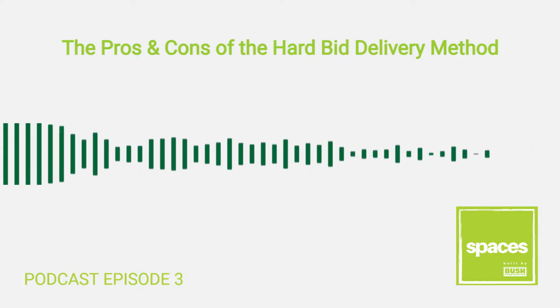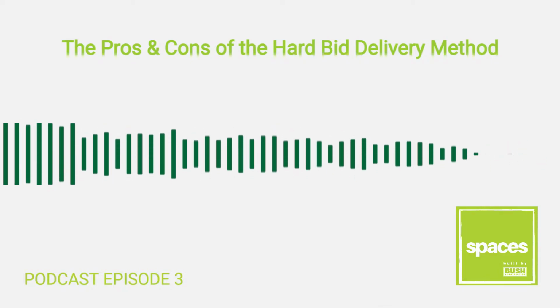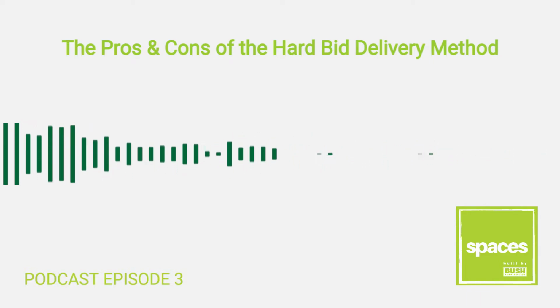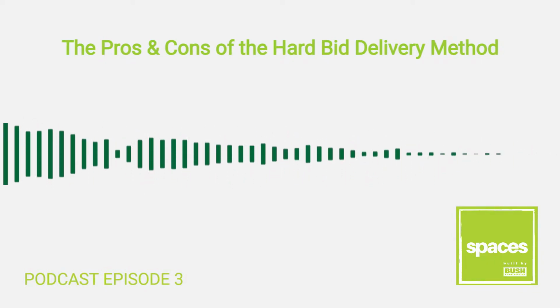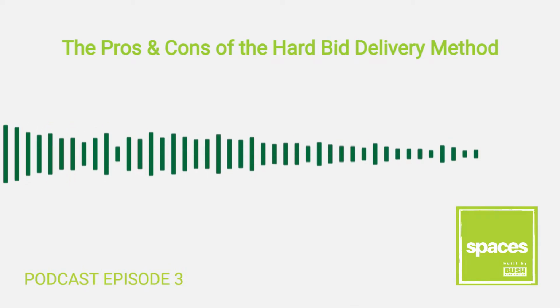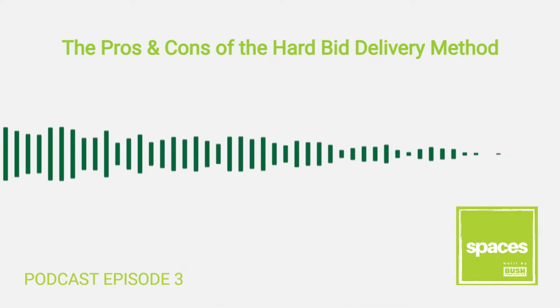Sure. Okay, let's go over nomenclature first. We call it hard bid, we call it competitive bid, we call it public bid. There's lots of different names to use, but we'll refer to it as hard bid during this episode. And really, pros and cons. The pros of the hard bid delivery method is that it's very simple to understand. The plans are designed, the plans are sent to contractors to bid, and then the contractors bid and provide a price, and they build it. So you design, you bid, you build. Okay? So it's very simple to understand.